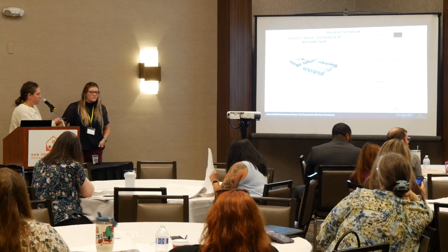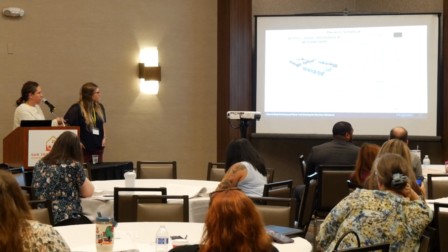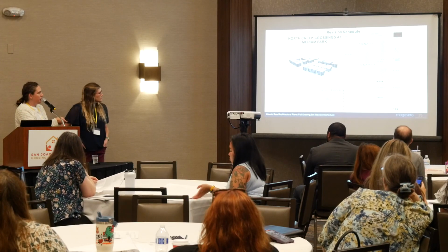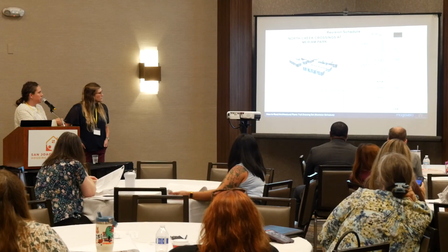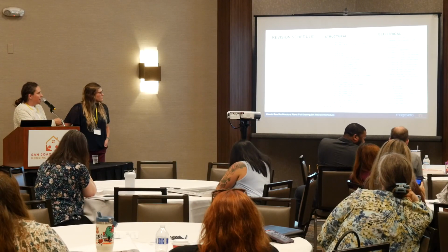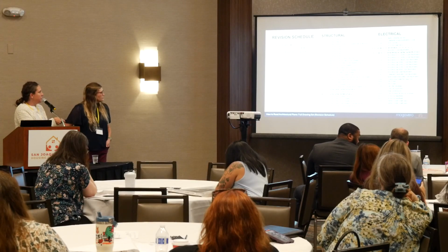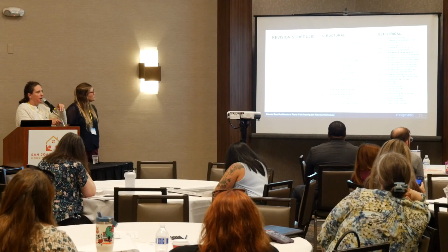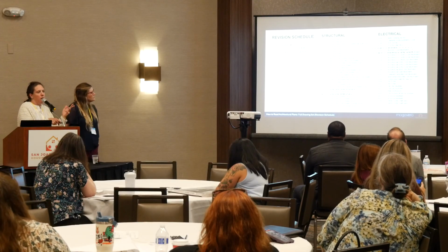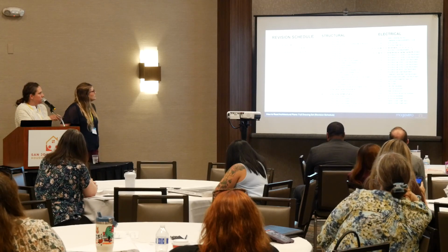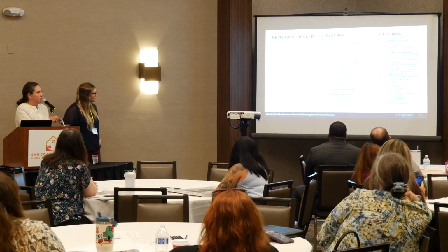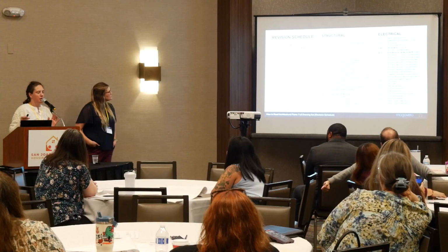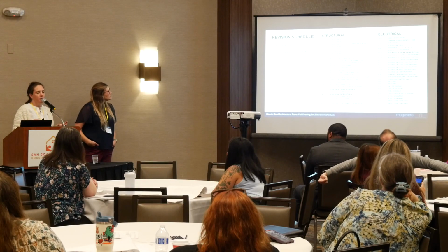So whenever we have a change, we have a little revision schedule on the cover sheet. And then whatever sheet has a change on it, we'll also have a revision schedule in the title block over here. What that looks like could be anything. In this case, we're changing the added sheets, so we're changing the index, but it could be a cloud like that around a door that would change. So it's just a cloud, and then the delta with the 2 in it means that was changed during delta 2. So if the plan checker had already checked delta 1, and now they're doing another round, they're only looking at the things in the delta 2 box.